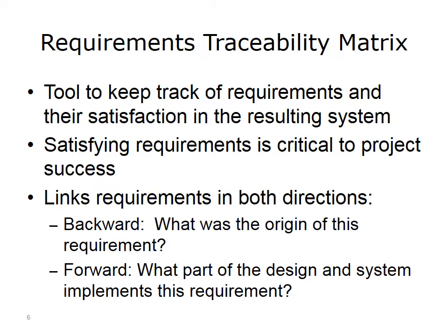A forward linkage addresses such questions as, where was this requirement satisfied in the design? More specifically, what part of the design? Can we associate part of this design with satisfying the requirement or part of the systems or services or processes that are established as part of the project? Are they really the ones that implement this requirement?